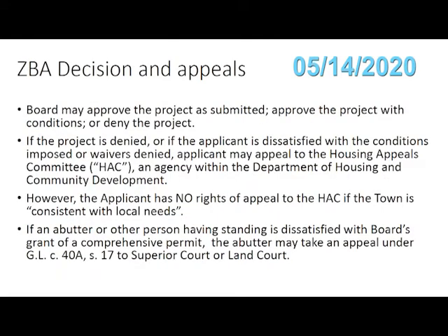So we're now at the end of the process. The board's closed the public hearing. We now have 40 days to render a decision. So what is the decision? Well, it's an approval with no conditions. That rarely, if ever, happens. It's an approval with conditions, or it's a denial for reasons.